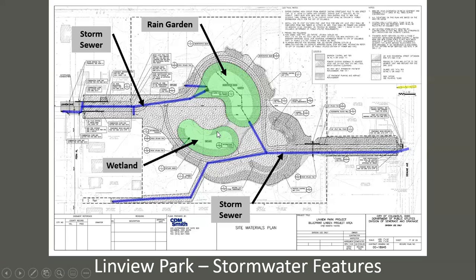So there is currently a wetland there now. We went through the process of working with the Ohio EPA on permitting the wetland that we're going to be placing back. So it is basically a restored wetland. It's going to be in its existing spot, but it's just going to be restored a little bit. Currently, it's full of trash and some tires and some other debris that we'll be pulling out of there, restoring and putting back into service. And we do have permitting from Ohio EPA to do that.